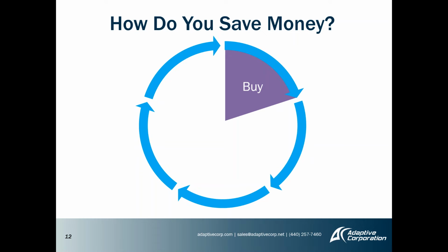Well, if any one program ordered just the amount they needed, and they happened to remember it early enough because it was a long lead item, they could save a little bit of money by ordering it early. But if they pool it and they recognize what the long-term demand was going to be at PPAP and at the later stages, they could save significant money by getting the price break on the volume they wanted. So this is one of those where the planning helps.